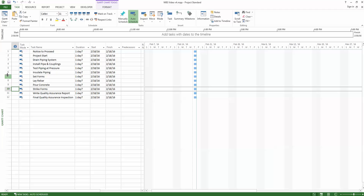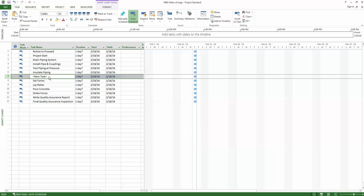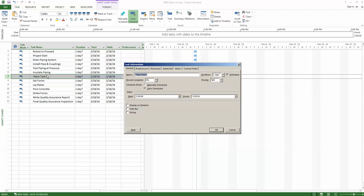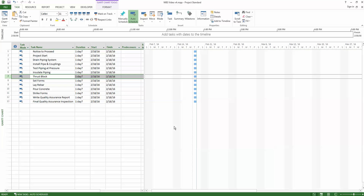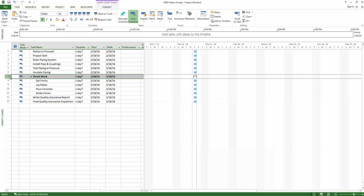We therefore insert a task above Set Forms and name it Thrust Block. Then we indent Set Forms, Lay Rebar, Pour Concrete, and Strike Forms — the related tasks — to generate the summary task or deliverable: Thrust Block. We repeat this process for the Pipe and Couplings deliverable and associated tasks.